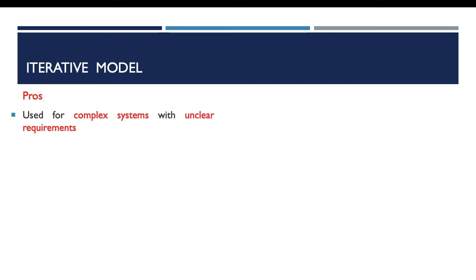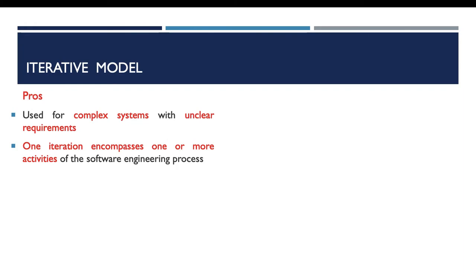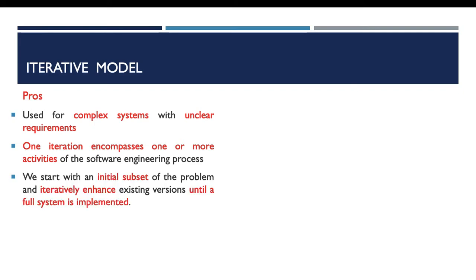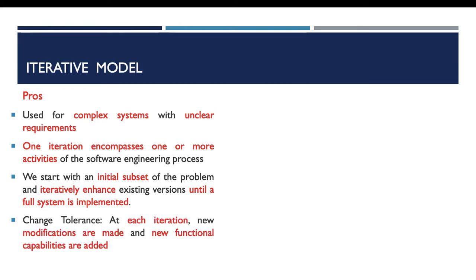Now for the iterative model: this model is used for complex systems with unclear requirements. One iteration in this model may include one or more activities. We start with an initial subset of the problem and iteratively enhance existing versions until a full system is implemented. This model is change-tolerant, so we can add new modifications and new functional capabilities at each iteration.